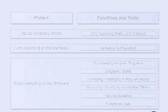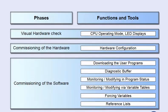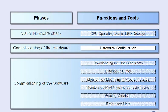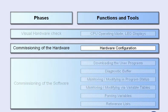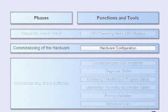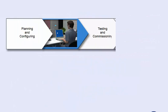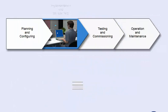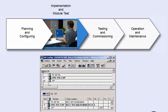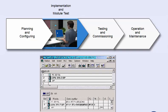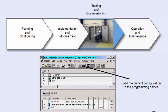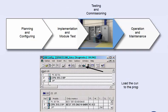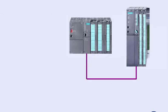The core area of hardware commissioning is the provision of the automation components with the correct parameters. Furthermore, this phase comprises wiring and signal testing of the process I/O. Normally, the hardware configuration is already generated by the programmer in the implementation phase. However, it can also be corrected or supplemented online during commissioning. Our first commissioning task involves establishing a connection to these two automation devices.